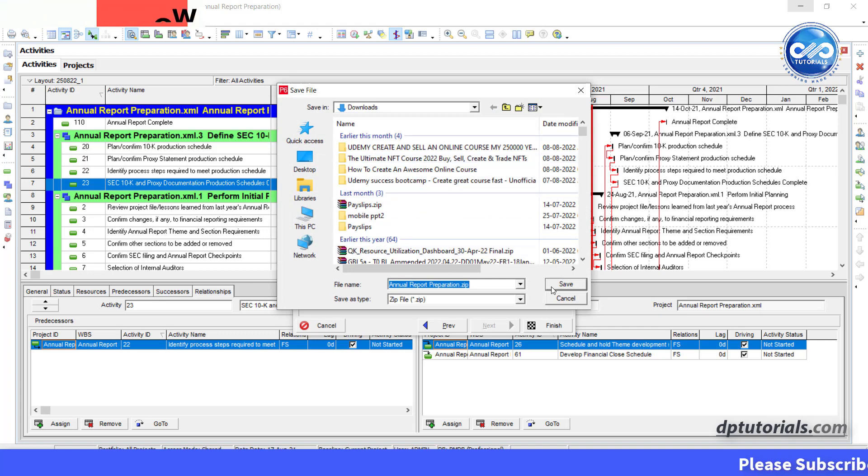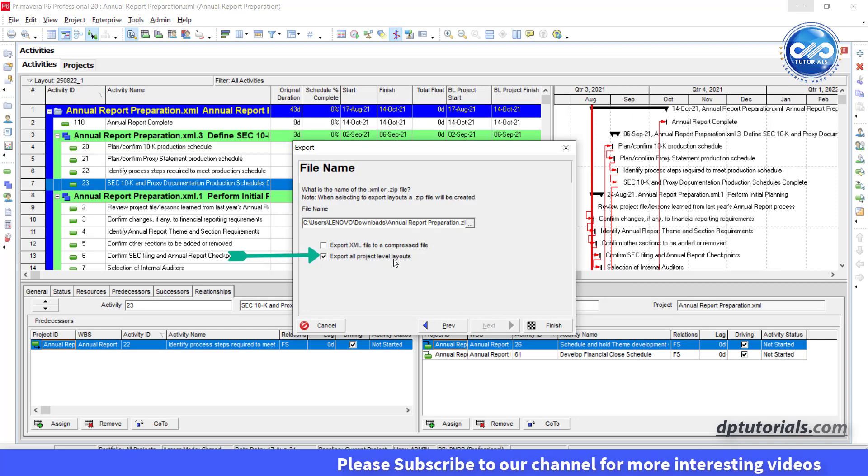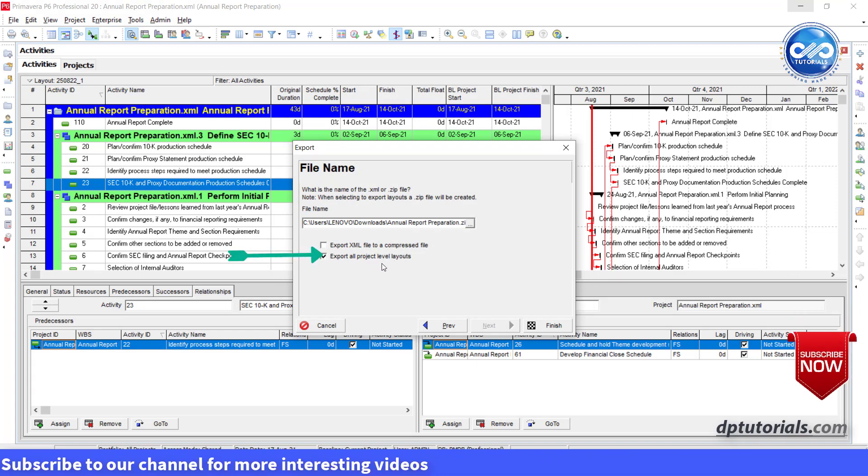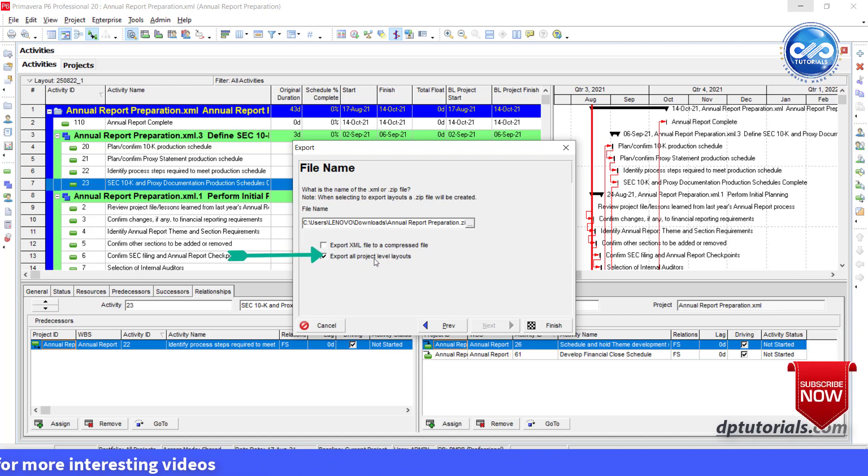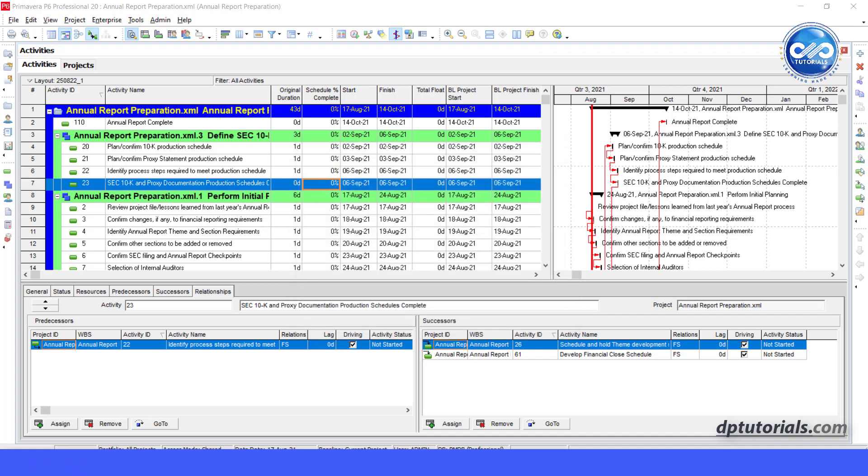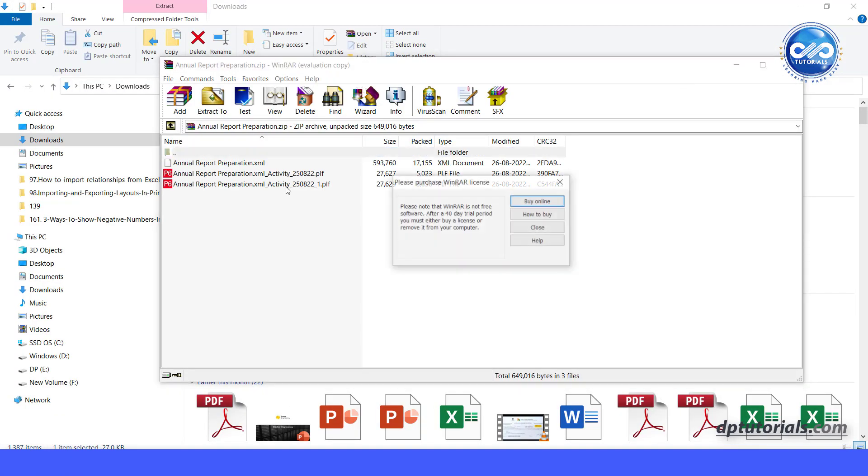Also make sure to select the option export all project level layouts. This option sets the export XML to include all the layouts along with the project and then creates a zip folder containing the project file and associated layout files as you see here.